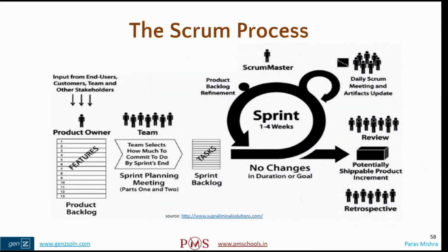So that is how the stand-up meeting is important. Product backlog refinement. I told you in the new Scrum guide, this is not there, but what we are doing there, and this is only a 2-hour meeting per 2-week sprint. If you have a 4-week sprint, you should be doing 4 hours, otherwise 2 hours. What are you doing? You are refining this product backlog.